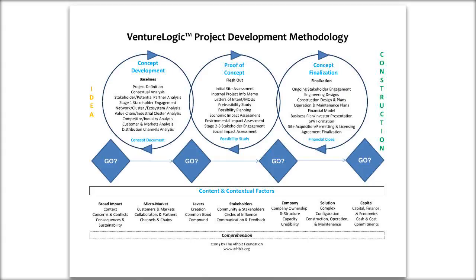Critical agreements are also key. On these projects you need to have your EPC locked down, your designs done, and your agreements — like a power purchase agreement — in place. All of these things will ultimately determine if your project is bankable and therefore if it gets funded. The process doesn't guarantee a bankable project, but it gives you all the tools you need to help you get there.